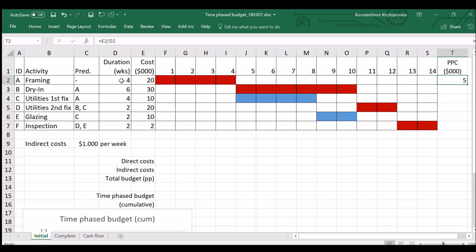So that's $5,000 per week. And we're making an assumption here. The assumption is that the expenses will happen proportionally. This is a very valid assumption for when we are developing time-phased budgets, although there would be some cases that we would like to do it a little bit different.